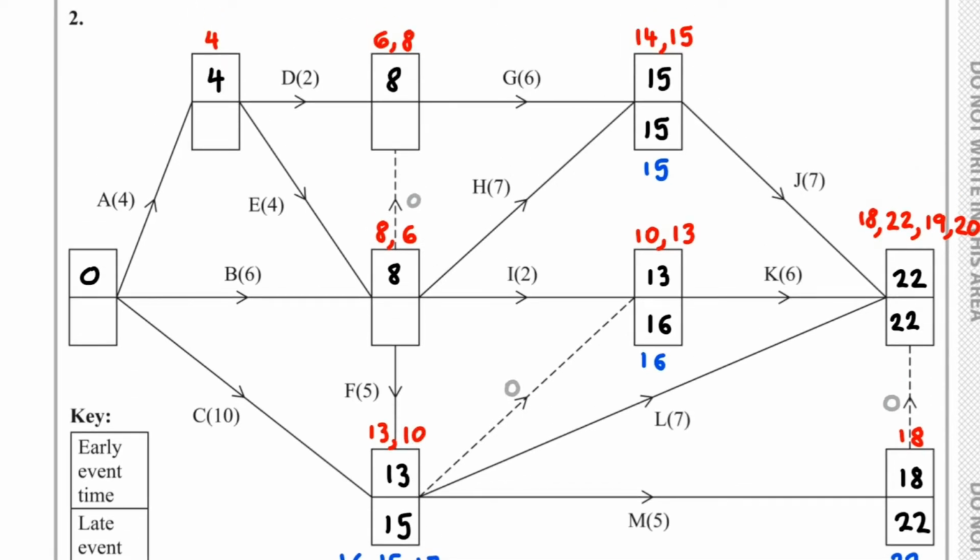Now, what would go here? 15 take away 6. That's 9. Nothing else to compare it with. 9 goes here.